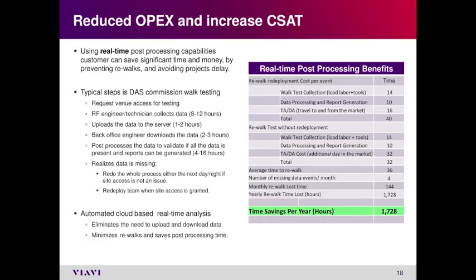Total, it can range, depending on the type of technology and the number of carriers you are testing, from 4 to 16 hours. Now, once you realize that data is missing or something is wrong, you cannot use that data to go back to your end customer, your operator, and say I've finished it and collected it. No, now I have to go back, make changes, and retest or rewalk, right? So guess what? It can take days in some cases.